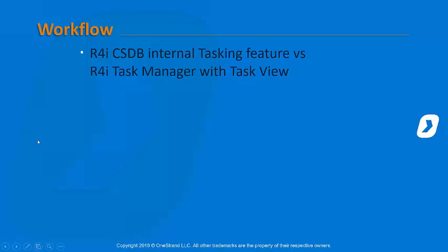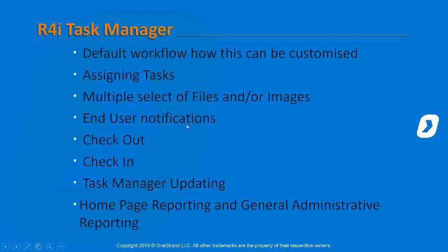Yes. Okay. So as I said, Task Manager does come with a default workflow, so you don't need to go through and wonder what you're going to do with it. You've got a start point. And with that, the only states you need to keep, that you can't do anything with, are New and Finished. Anything in between, you can customize to what you want.